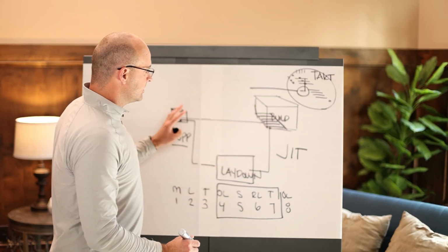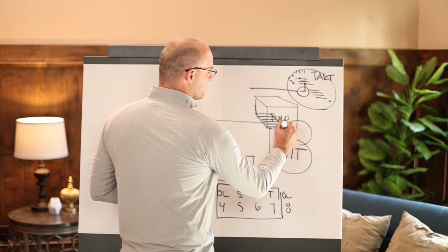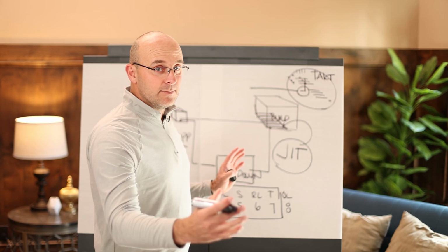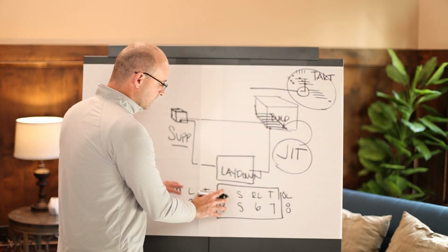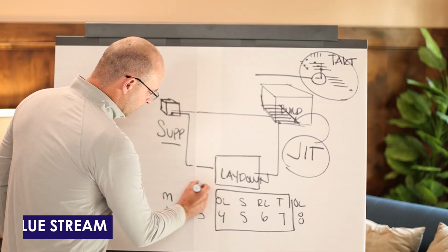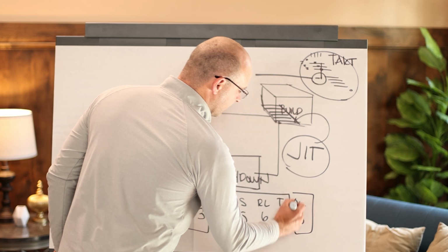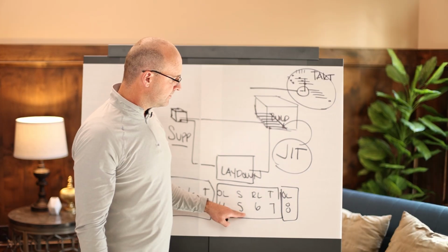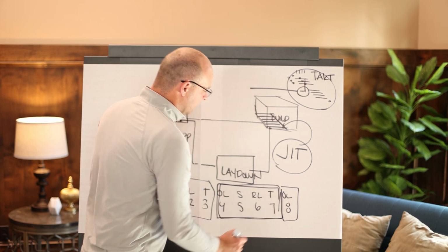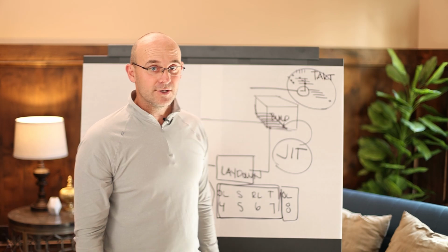So just-in-time deliveries at its root means just in time at the place of work when it's ready to be built at the most efficient supply chain, or what they call value stream. Meaning whenever we can, we only want to do the steps that add value to the process. Sometimes you'll need to do the laydown, which adds these steps, but that's only when it's more effective or less expensive than staging too much on the building.